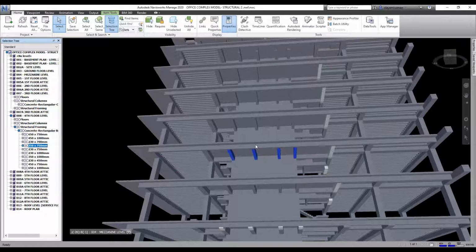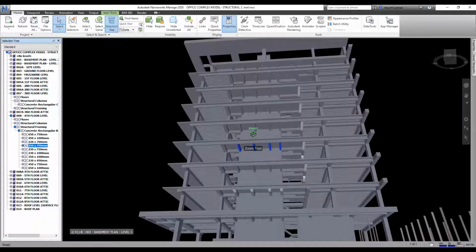So another important thing we need to understand is that in doing line measurements, in the traditional way of doing things, we don't really consider, because it is minute, the point of intersection between columns and beams. We take it as minute. But when you talk about digital construction, it's more of giving you the exact. Let's say, for example, I want to see the line is breaking here, please.